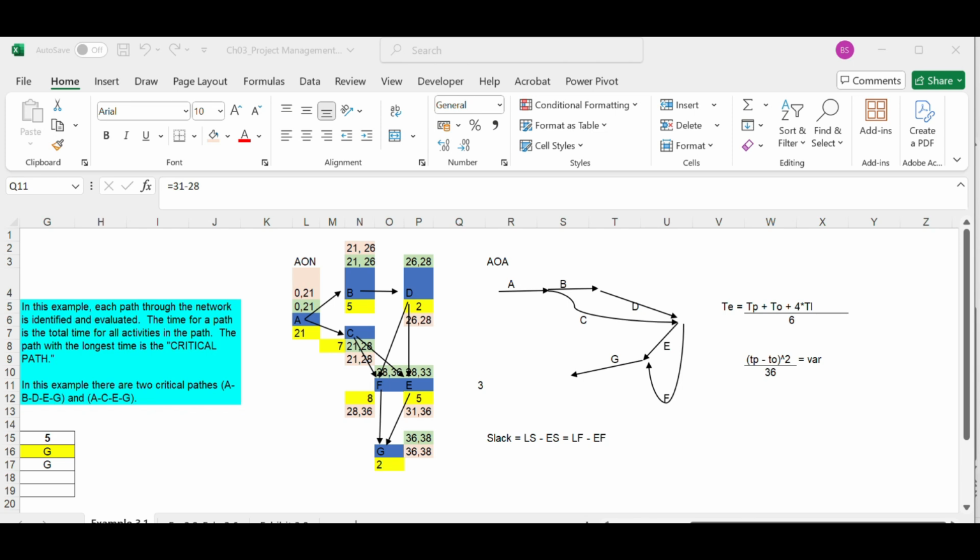We do not have control over the logical dependency of an activity, but we have control over the resource dependency of an activity. Slack comes out of logical dependency. Putting a float on a path gives more flexibility. Put it at the end of a path rather than at the end of an activity so that we can account for the duration of the path. Each activity might not need a float, but a path altogether might need a float. If we put a float at the end of an activity, only that activity will get the benefit of the float.